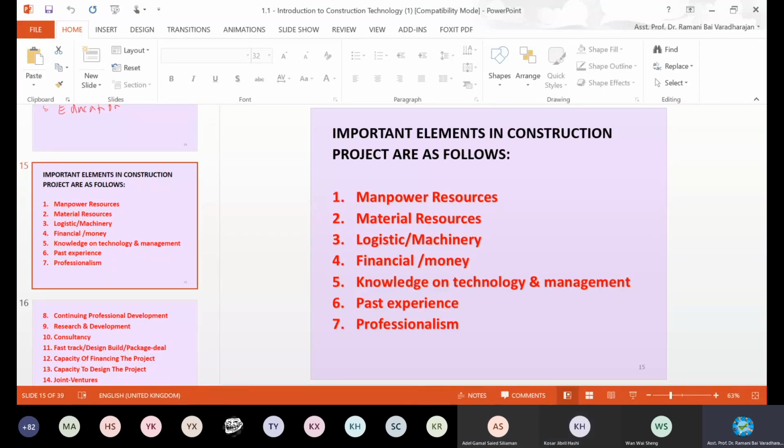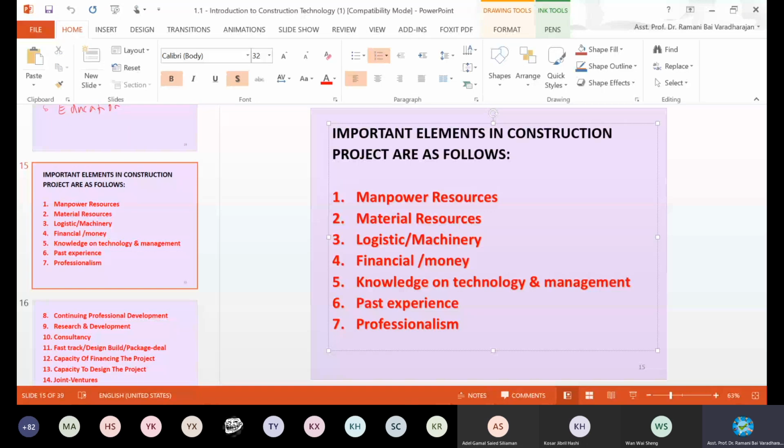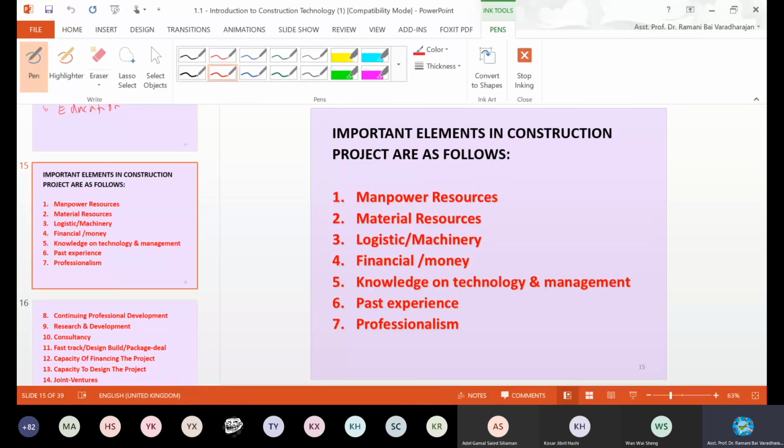Okay, good. Manpower resources. You should check whether you have all the personnel involved or available. Are they nearby, or you have to buy from other districts, other country, and so on. Material resource, same goes to same risk, whether it is what is the lead time taken for the materials from the source to your site, your storage house, right? All the materials you need to check whether they are available. Number one, available. Number two, quantity, right? The measured quantity, according to your bill of quantity, is it matching? You must check all this.